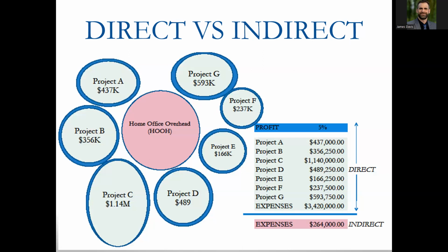But I also have a manager that's overseeing it. I have a truck that's running around, but I can't charge that truck to that one office. I got to charge it to the whole project. So again, it's a direct cost, but it's an indirect direct. And that is very confusing to some people when you put the proposals together.